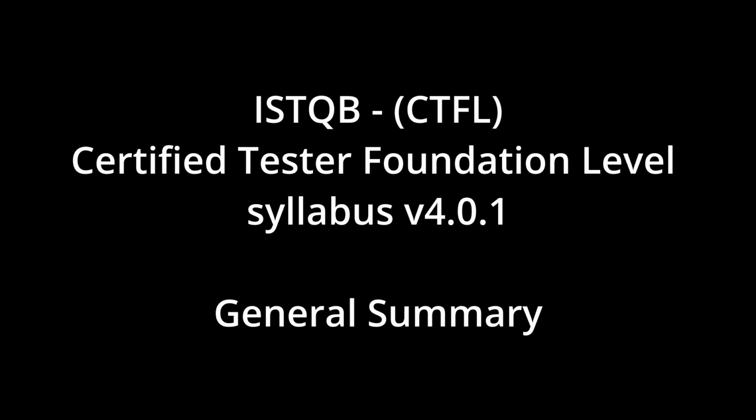Okay. Finally, under the SDLC umbrella, the syllabus mentions retrospectives. What's their role? Retrospectives are a core feedback mechanism for process improvement, typically held at the end of an iteration, a release, or a project phase. The team gets together to reflect objectively on what went well, what didn't go so well, and identifies specific actionable steps to improve their process going forward.